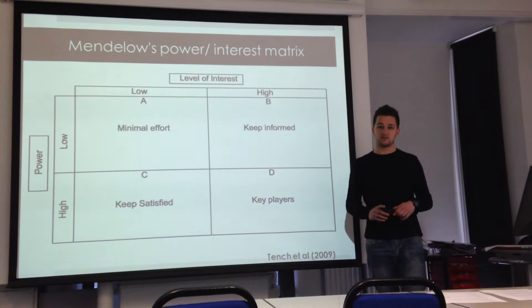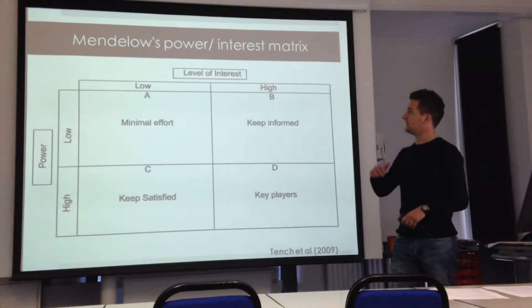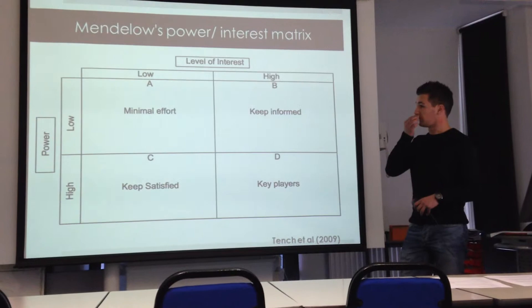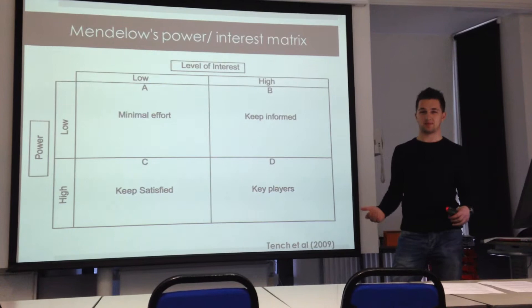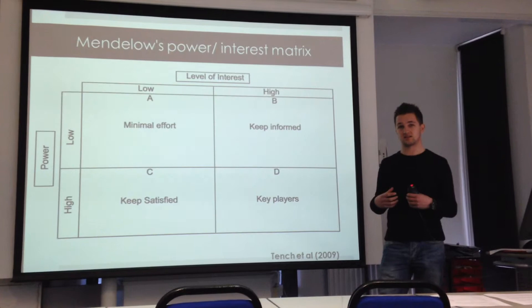We need to prioritise our stakeholders using Mendelow's power-interest matrix. It plots the power a stakeholder has against their interest, showing the impact they could have. If they have low power and low interest, it takes minimal effort to keep them happy, as they can't really do much — they haven't got the power or the interest to impact the project in a negative way.